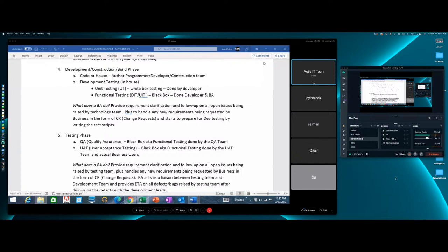Your front-end developer is developing the front-end, the back-end is developing their back-end. They can run into problems with their unit testing, so that is why you are having delays. You understand? That's correct. Another reason can be you are waiting for a third party dependency. Yeah, that may be possible. And they have not delivered the code piece, or they haven't delivered their interface.